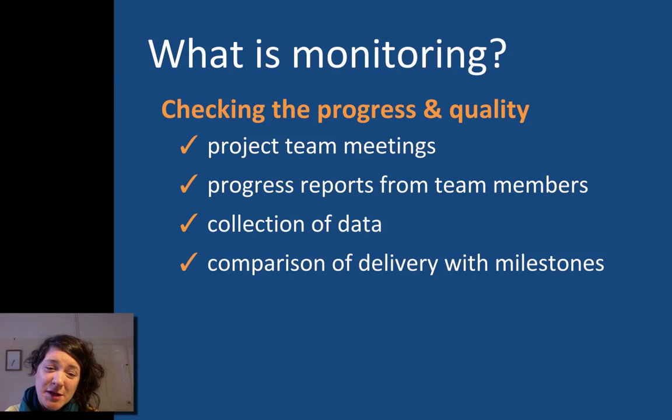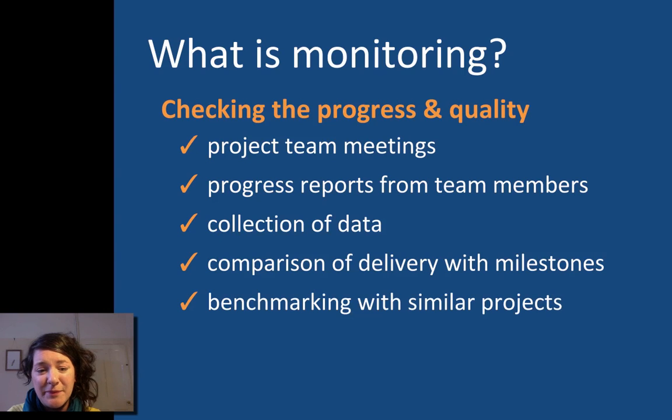You're also going to want to look at comparing what you're doing, the delivery of your project, with the milestones that you've set for it, and benchmarking with similar projects. So somebody at another organisation, or possibly your organisation, has already run a project quite like this. So you could be using their standards as a benchmark with which to work out where your progress and the quality of what you're producing is.